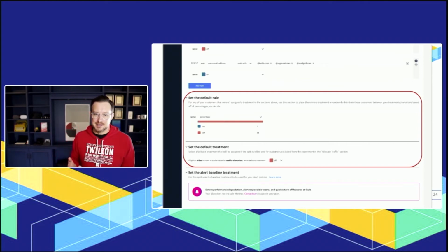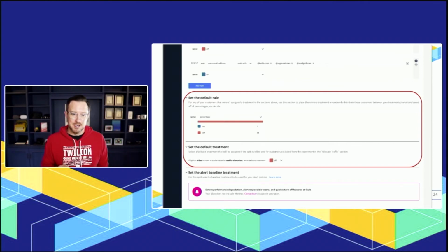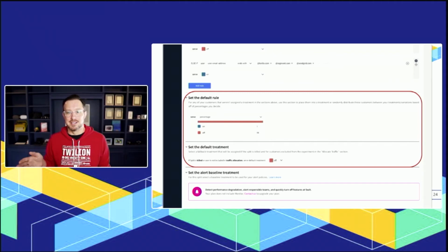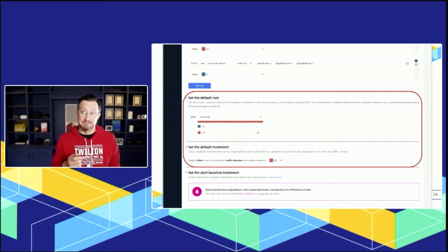So the next piece is defining these rules. So here is really where that slow roll starts to come out. And you may be able to see here, I'm actually exposing 1% of our total traffic to the opt-in button. Now, day over day, I've been able to increase that, and so this starts to decrease certainty, or I guess increase certainty in the rollout, maybe.